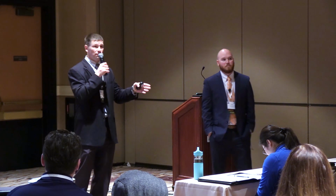But at the end of the day, the ECMs and the FIMs we usually come up with are major overhaul or small renovation projects. And what they oftentimes need to do is get some capital funds to come back and do these things. A lot of times it's not simple. They actually need to engage a designer. Now we are engineers, we're PEs, we can provide them with that service, but a lot of times they'd prefer to find another design firm to design the fix, have us review it, and see if we agree that it's going to get it fixed or not. Then they get a contractor, they fix it, and they bring us in to recommission it and make sure that it's working correctly.